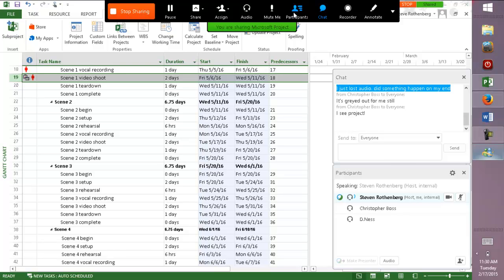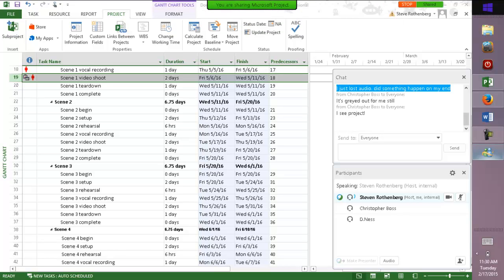If the project manager does not key in exceptions, vacations, holidays, then Microsoft Project will think that there's more resource availability than it really is. And on the other hand, if all of those exceptions and holidays and every possible reason why you may not have a resource available on a given day, if Project knows all about that, when it starts scheduling tasks, it will give you more realistic end dates for tasks.